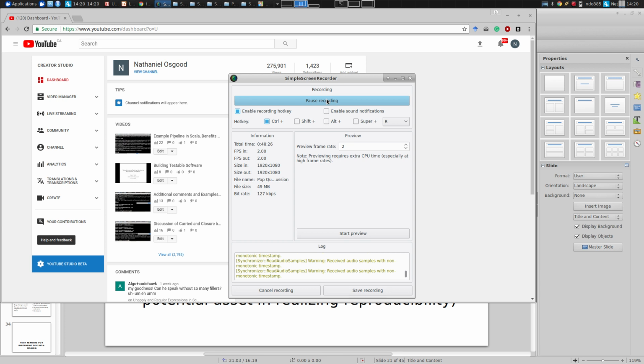So it's not totally reactive, but it really waits until the situation occurs dynamically to undertake the big action, which is typically enshrined in the plan. So you have in place this plan, and you undertake it to deal with the situation at that point, and at that point it mitigates the issue. It sort of has dealt with it, but you're waiting for the actual risk to materialize rather than just doing it. And these are not just nice concepts. These are key things. Even having that plan in place means often you can nip the issue in the bud. You can jump on it at the time that it occurs.